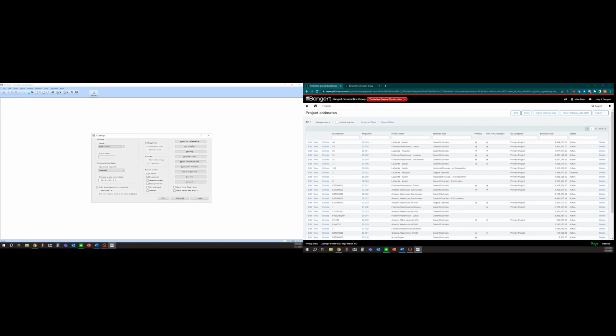If we go into settings real quick, there's post and interface. And you can see here, we are on automatic. So as soon as I hit finish, it did update the budget to the project. But if we were on manual, it wouldn't have, and you may not have gotten your numbers up to date. So sometimes it's a guessing game in 300, but be aware of it there.